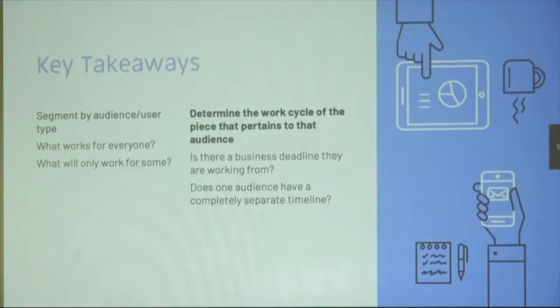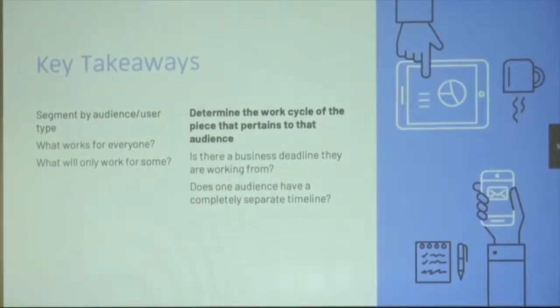We also determined that, obviously, with the university, we're very driven by the student cycle, by the class cycle. And so when we were trying to figure out which piece of functionality to deliver first, it was kind of who can we hit that's that 80% and how can we do it in such a way that it will actually measurably improve their business process within the next cycle of time for class scheduling.